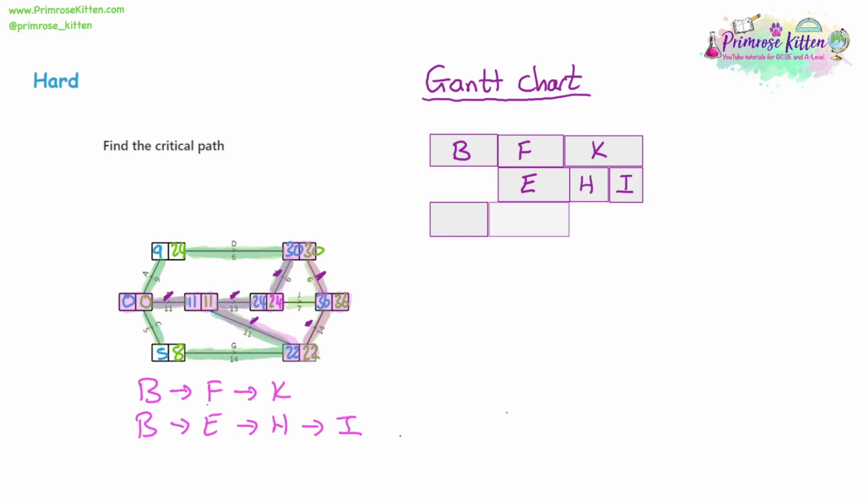So now let's have a look at C. And C is going to work the same way. I'm going to start at the start, have a width of 5. Let's label C. But C could go as late as 8. So what we can do is extend the box to 8, like this. And we're going to have a dotted line around that as well. Then we can see that C can slide forward a little bit, not too much though. So now let's cross out C.